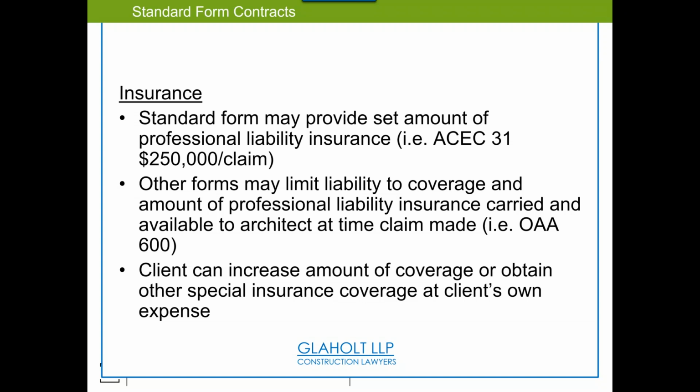So liability, we have this minimum amount. Sometimes clients try to limit the liability to just the insurance. And we'll try to do so. We'll do that, for example, saying, you know what, sign the contract, my liability is limited to the $250K insurance, which makes sense. If something fails, I have insurance to cover me. Oftentimes clients say, yep, that's not enough. I want you to have insurance up to 1 million liability, 5 million liability. Sometimes there's crazy numbers. So we might end up getting project level insurance to cover.